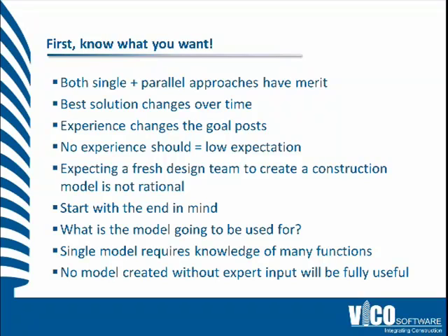And as I mentioned here, we're trying to find out what the model is going to be used for before we're creating it. So thinking about that and answering many questions like that is the starting point for deriving the MPS. And no model created without expert input will be fully useful. So we really need to know what the estimating team requires, what the scheduling team requires, in order to generate a useful model for them.